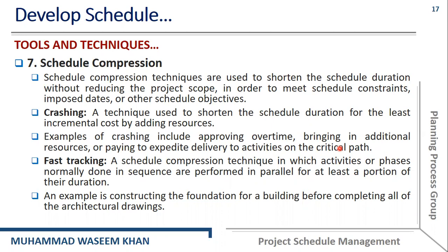And another technique is the fast tracking technique. Fast tracking is a schedule compression technique in which activities or phases normally done in sequence are performed in parallel for at least a portion of the duration.